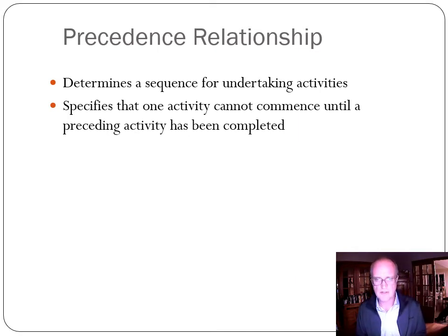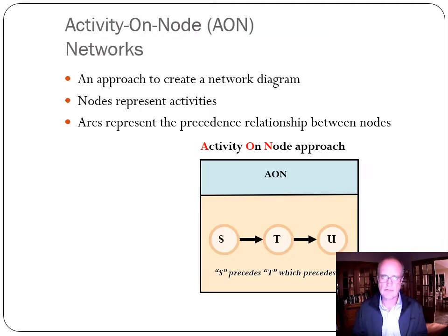We can't prioritize longest tasks first, or use a variety of priority tools, in the absence of considering the precedence relationships. So if one thing has to finish before the next thing can start, we need to identify that, because those tasks are then inextricably linked, and we need to take that into account.